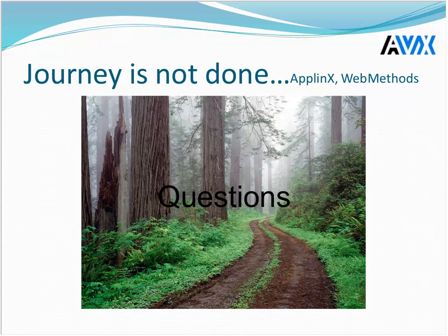Okay, and I'm going to fly against my rule. One last question. Was this rehosting only one system on the mainframe or every system on the mainframe? It was every Adabas Natural system we had on the mainframe. We physically got the mainframe out of here. So it was a sales order entry system. It was a manufacturing system. It was a costing system. It was a customer forecast system. It was our entire systems. Rather than trying to convert one system at a time and having all these integration points that we need to convert, it was a pick up and drop, complete replacement all at once.